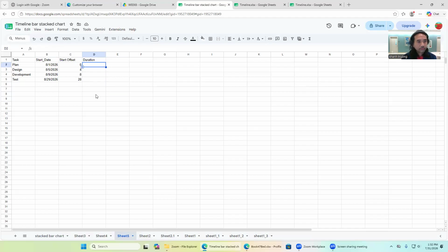Let's say you see this one right here. Let's say a simple project consists of different phases, different stages, and each task is kind of like a dependency list. Like the next task cannot be started until the previous one is completed, right? So that's why you have this one. You cannot start doing the designing unless the planning is done. You cannot get the development stage started unless you get the design part done, right? So on and so forth.